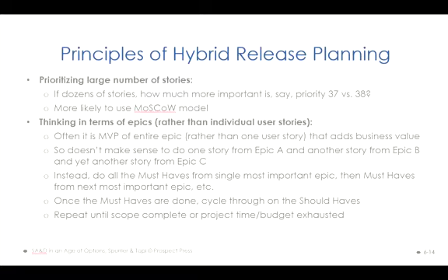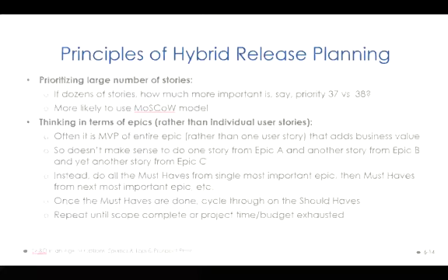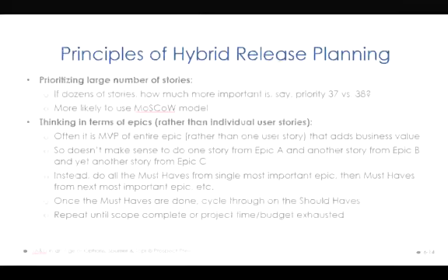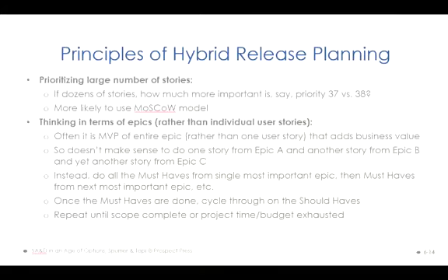And the other thing is to think in terms of epic. Epic is designed as an essential set of user stories that you need to perform and complete. And MVP stands for minimal viable product, or minimal viable set of this epic or user stories you need to perform. Both of them are telling you a very important concept. That is, in a lot of these desired features, actually the functionality requirements, using the term requirements would probably be more accurate, all these requirements you can collect from the user or from the stakeholder. Some of them are must-have.